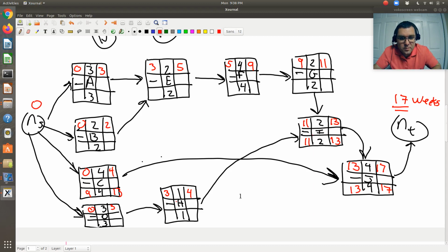Let's go from I to H. So if the latest possible starting time of I is 11, then the latest possible finishing time of H is 11. Has a duration of 1, so the latest possible starting time of H is 10. Then if we just take that back to D, H is dependent on D. So if the latest possible starting time of H is 10, the latest possible finishing time of D is 10, has a duration of 3, so the latest possible starting time is 7.